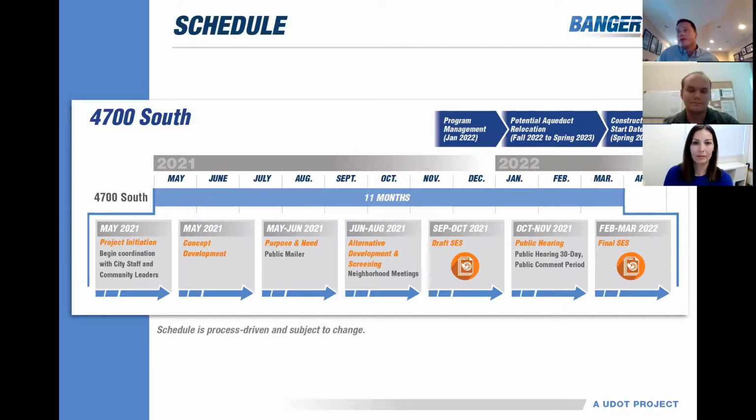Those intersections are closer spaced, so it makes the traditional approach of converting an intersection to a freeway-style interchange more difficult because the ramps will impact one another. So that project has to be looked at as a whole, as opposed to an intersection being converted to an interchange. And that's why that represents a much higher cost, and that's been funded for a later year.